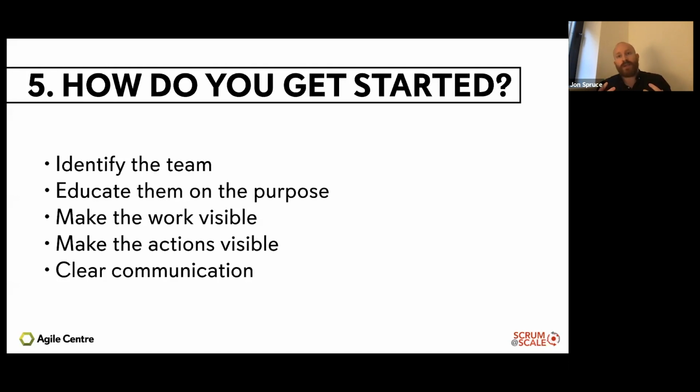So as your team is working and they're making those impediments visible at a team level and maybe at a Scrum of Scrums level, these impediments sit on a backlog and they can become very visible all the way through to hit the executive action team. Now, if they can't get resolved at each one of the different areas of the business, the EAT are there to then remove it, but make that work visible. It can't just sit in a PowerPoint presentation in the back of somebody's risk log. It needs to be very visible, and it needs to be seen that there's action taking place.